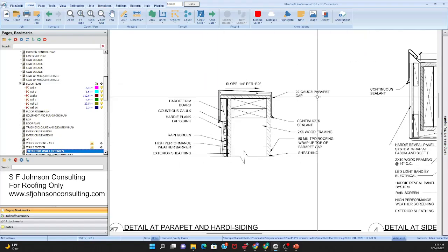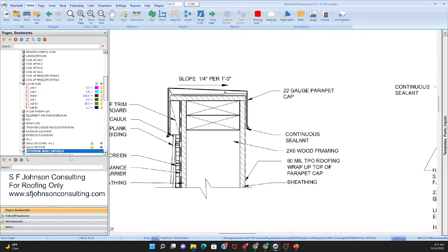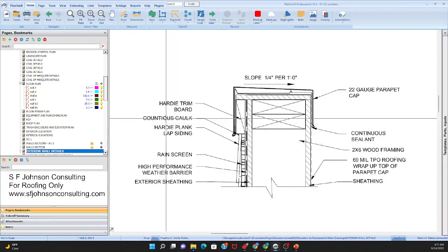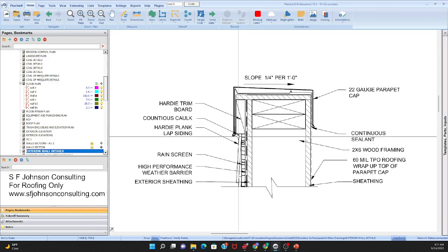And so now I know that, because I'm looking at the plan for my takeoff, even for the rough carpenter, I have 2 of these top plates. So 2 times the perimeter of the roof, if I'm doing my takeoff for that. I know I have a sealant, continuous caulking. So I know how many linear feet of caulk I have. So I know from the container how many linear feet of caulking, 8 ounce, 16 ounce, 32, whatever, a bucket, whatever. So that way I can do a proper takeoff to do a proper material cost determination, right?